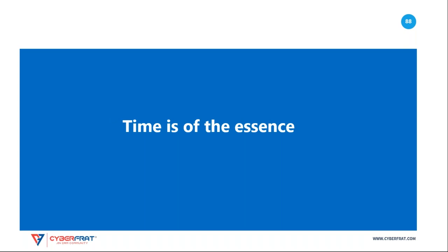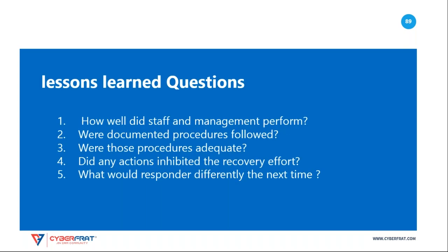Time is of the essence with a lessons learned session, because as time passes, details quickly become fuzzy and memories are lost. The more quickly you conduct a lessons learned session, the more likely it is that you will receive valuable feedback that can help guide future responses. NIST offers a series of questions to use in the lessons learned process.